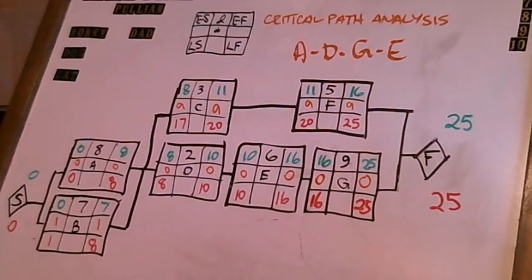So in this particular case, when you look at this network diagram, your critical path, and as you can see, I've got it up there noted already in orange, is A, D, G, and E. Each one of those activities has 0 float. And so when you think about the critical path and what it means to have 0 float, what that means is that that particular pathway through your network diagram is going to be the longest path through your network.